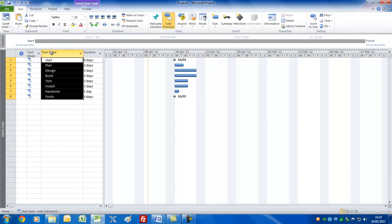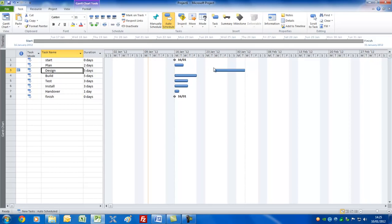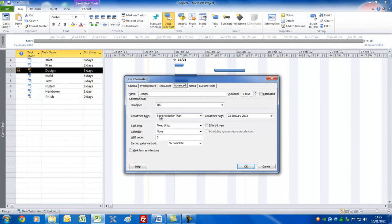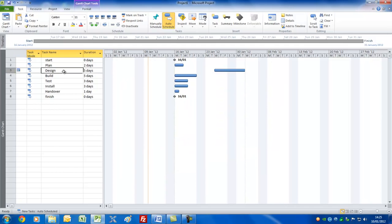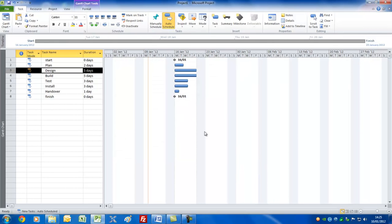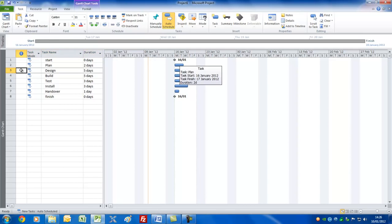I'll just undo that. Be careful not to move the task sideways, because it will set up a constraint. You can find out information on any task by double-clicking its name, and you'll see here if I go to Advanced that by moving it out in time I've set a 'Start No Earlier Than' constraint — which means there's a brick wall in time and this task will not go before it, which is a bad thing to do unless it's a real constraint. So I'm going to double-click and put that back to 'As Soon As Possible', which is the default setting. When you link, be careful to go down or up, never left or right, as you might inadvertently drag the task — but notice that if you do drag it, you get a little warning sign.